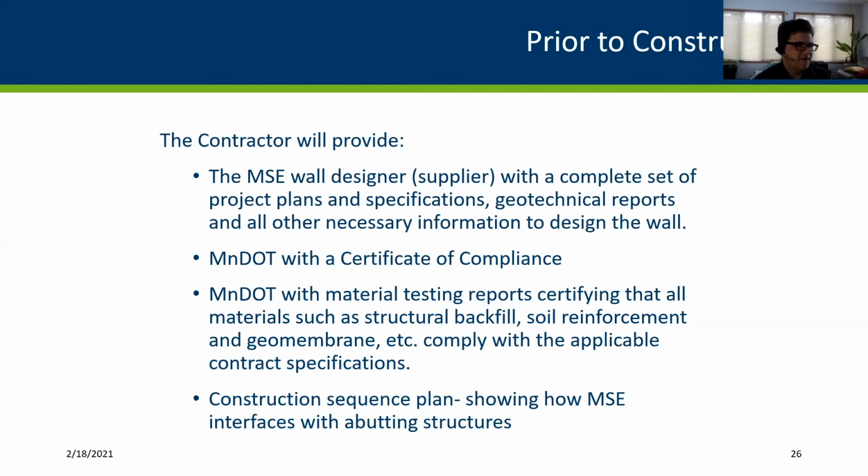They'll also have a construction sequence plan. So how's this wall coming together? And it's going to show several of the features in the wall, and it's also going to show how it's going to interface with abutting structures like bridges or other CIP walls that may need to be placed on the project.